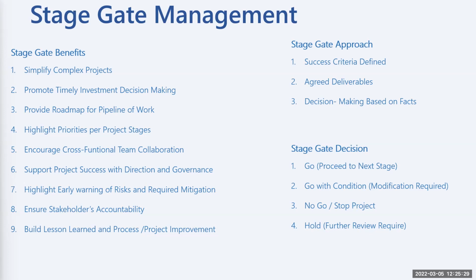It also highlights early warning of risk. So if there is a risk that has been identified at the beginning of the project and it's not being tracked, or there isn't any information about it, even though there is a risk log or risk register that has captured it, because of stage gates, they would want to ask as many questions. Stage gates also involve external and internal stakeholders to review that phase of the project before you can go to the next stage.